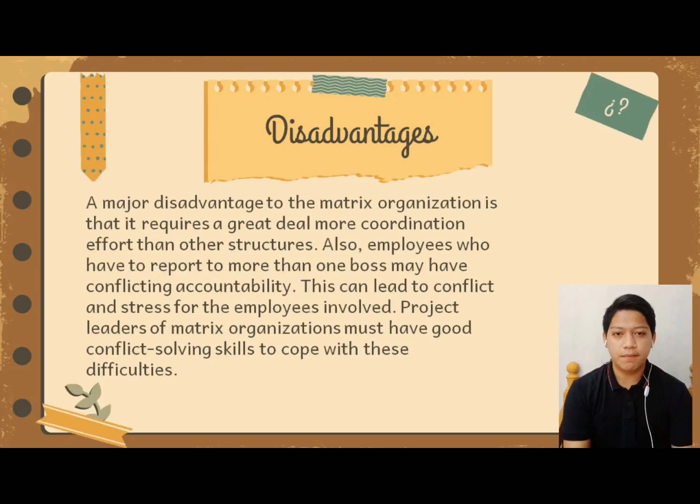Now, the disadvantages. A major disadvantage to the matrix organization is that it requires a great deal more coordination effort than other structures. Also, employees who have to report to more than one boss may face conflicting accountability. This can lead to conflict and stress for the employees involved. Project leaders of matrix organizations must have good conflict solving skills to cope with these difficulties.